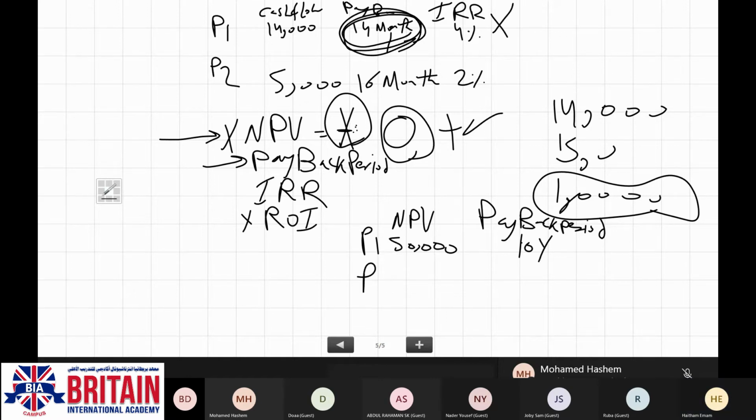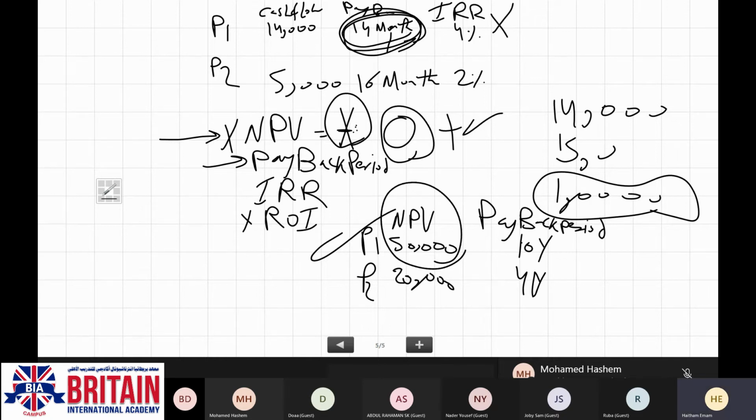Project 2 has, let's say, 20,000 and a payback period of, let's say, 4 years. I'm going to select the project which has the higher NPV, even if it has a longer payback period. Why? Because I'm going to make more money.